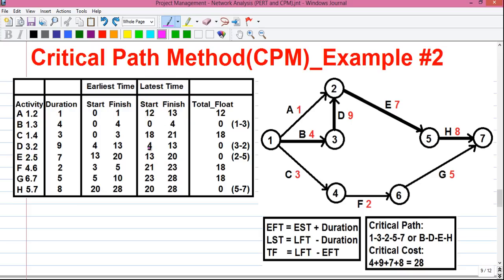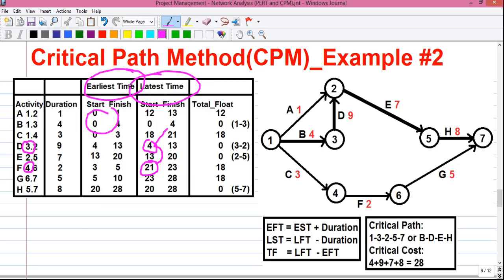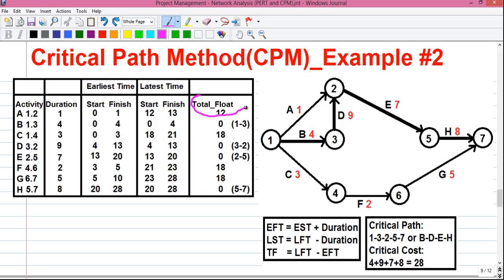Remember, while picking any value from the left-hand side, if we have multiple occurrences of the same number, we compare the two values and take the minimum value. So for latest time we take the minimum value, and for earliest time we take the maximum value. For earliest time, it is also called the forward pass calculation, because we read values as 1 to 2. But in the backward pass, we read them as 7 to 5.